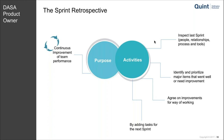The sprint review is really your moment — you talk to your customer, take the whole journey from product vision to delivering value, do a great demo with the team, have the team tell the customer about what they've done, and then make the necessary changes to the product backlog. Sometimes this might be the only moment you really get time to talk to your stakeholders and customer. The sprint retrospective is more about process than product — pick your role in the team and make sure that when you talk about continuous improvement, you visit this meeting. Add any activities that come out of it to the next sprint.